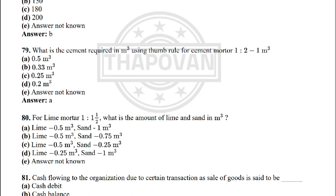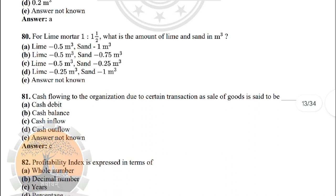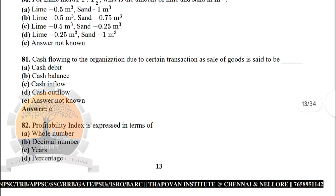Next: the cement required in m³ using thumb rule for mortar 1:2 for one m³ — the correct answer is option A: 0.5 m³. Next: for lime mortar 1:1.5, the amount of lime and sand in m³ — the correct answer is: lime 0.5 m³ and sand 1 m³.